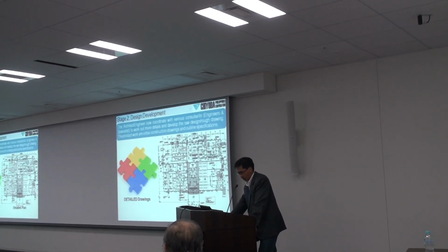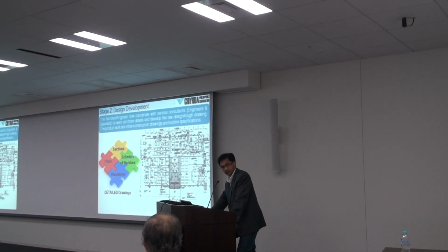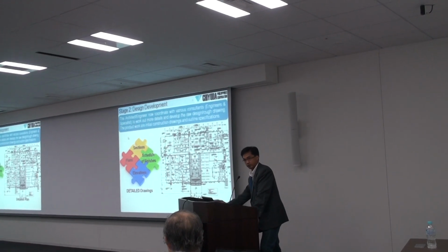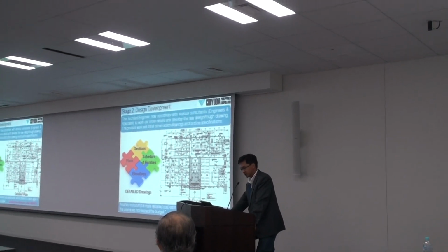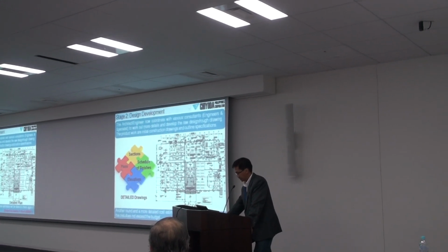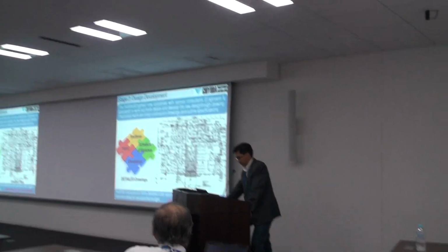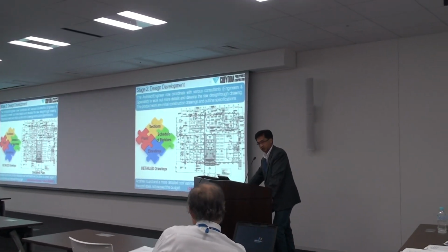So in this stage, we also have 4 drawings, which are very refined and very detailed already. The connection is very precise already. So another round and a more detailed cost estimation will be done to check again if the cost does not exceed the budget. This means the detailed cost estimate is less than or equal to the client's budget.